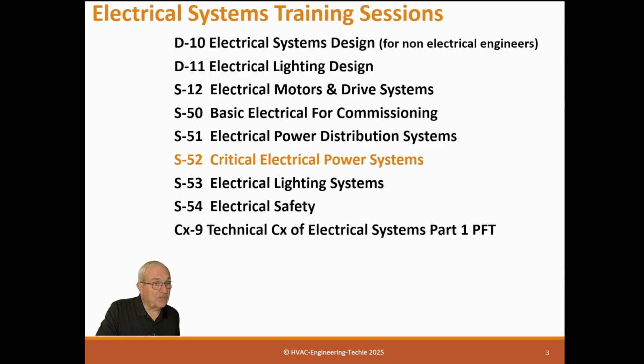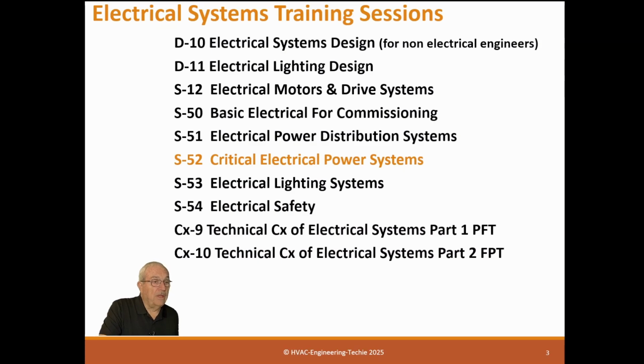S54 is electrical safety. CX9 is the technical commissioning of electrical systems, part 1, and CX10, which is technical commissioning, part 2. Part 1 basically is all the pre-site stuff and all the startup paperwork, and CX10 is basically functional testing, where we actually prove the system is functional. So hopefully those will be helpful for you.